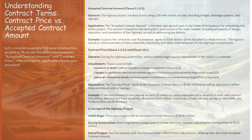This journey is marked by adjustments, variations, and unforeseen challenges, each playing a crucial role in shaping the final cost of our highway project. First, let's consider variations in work. Imagine our highway project initially planned for four lanes. However, midway through, the decision is made to expand it to six lanes to accommodate future traffic. This change, seemingly simple, has profound implications — more materials, more labor, and more time, all leading to an increase in costs. Such variations are not uncommon in large-scale projects.